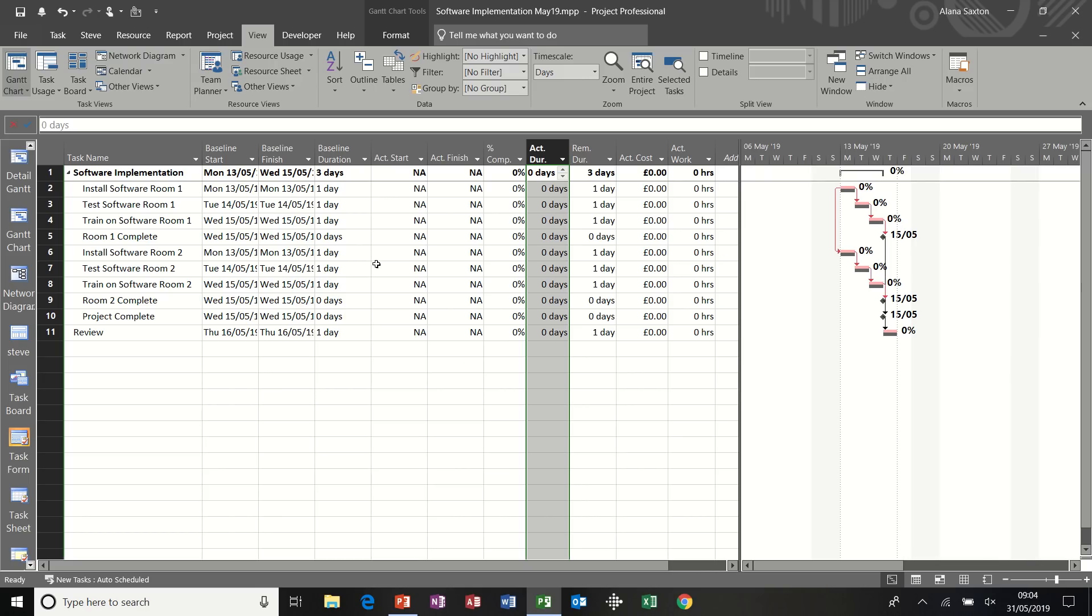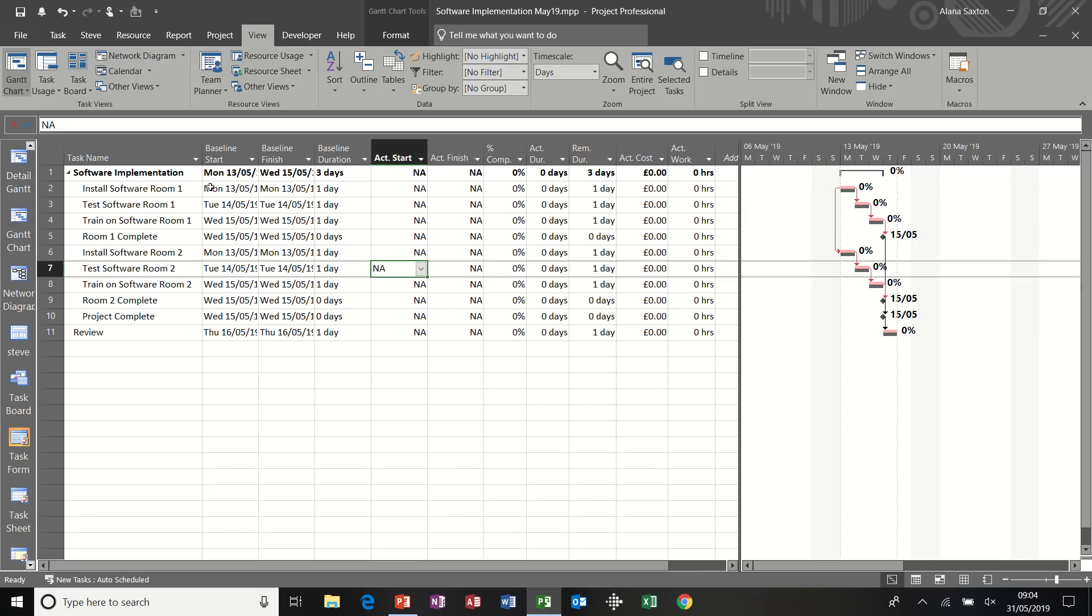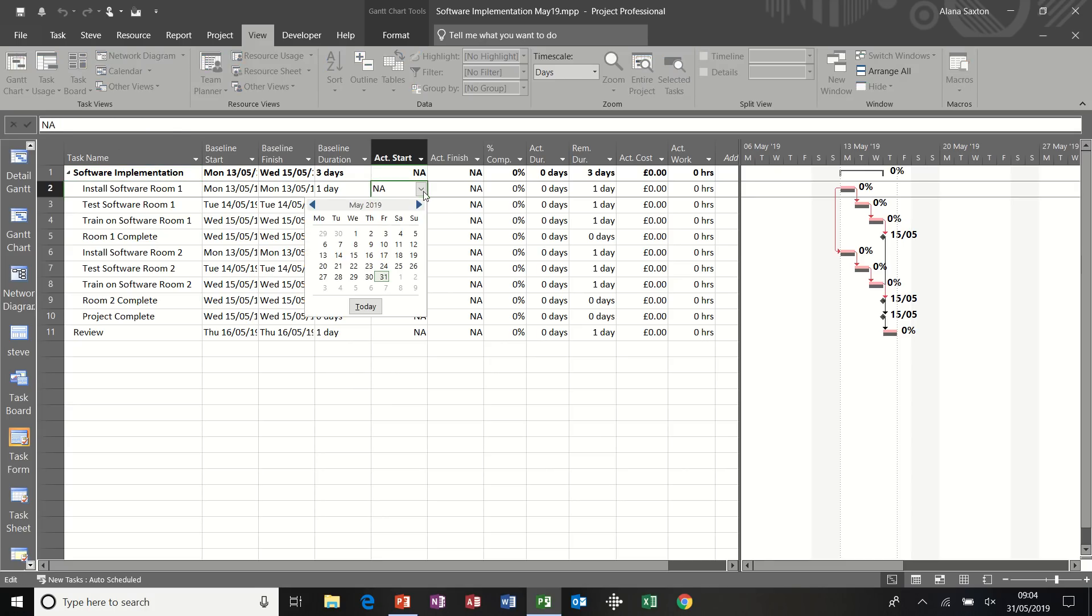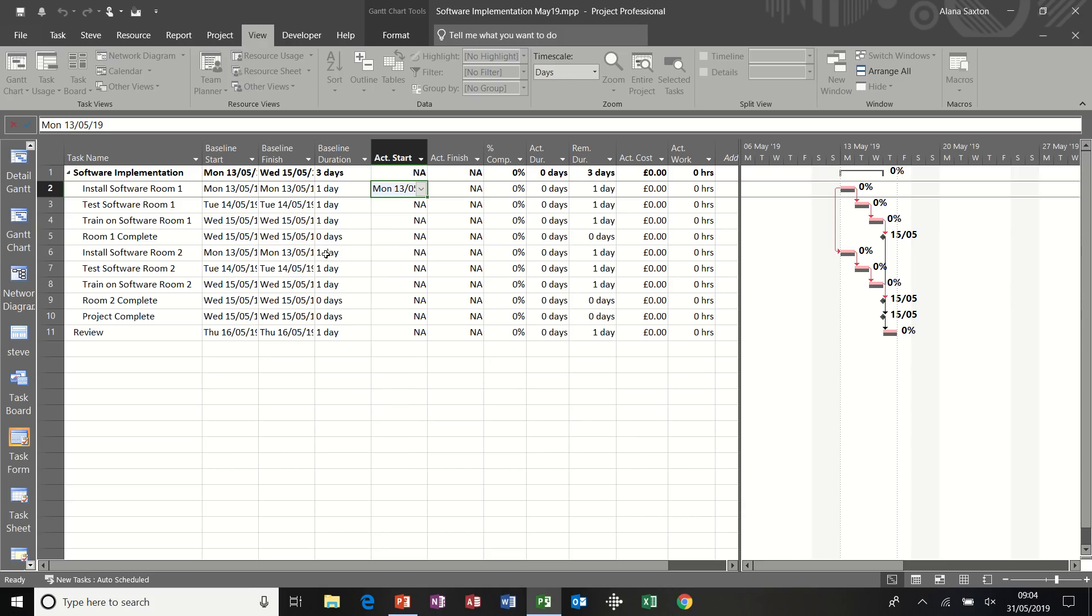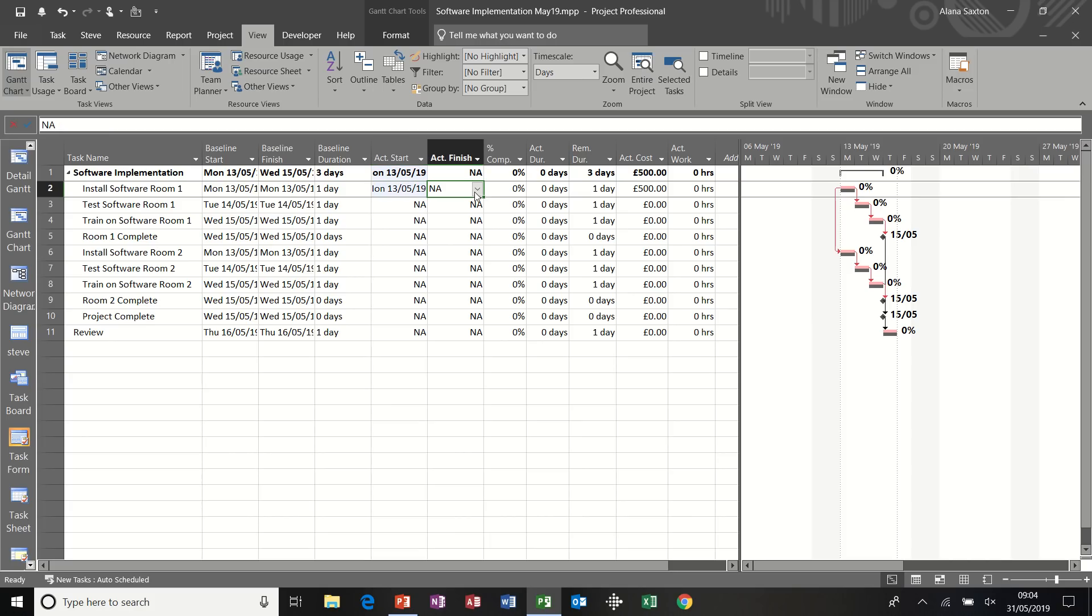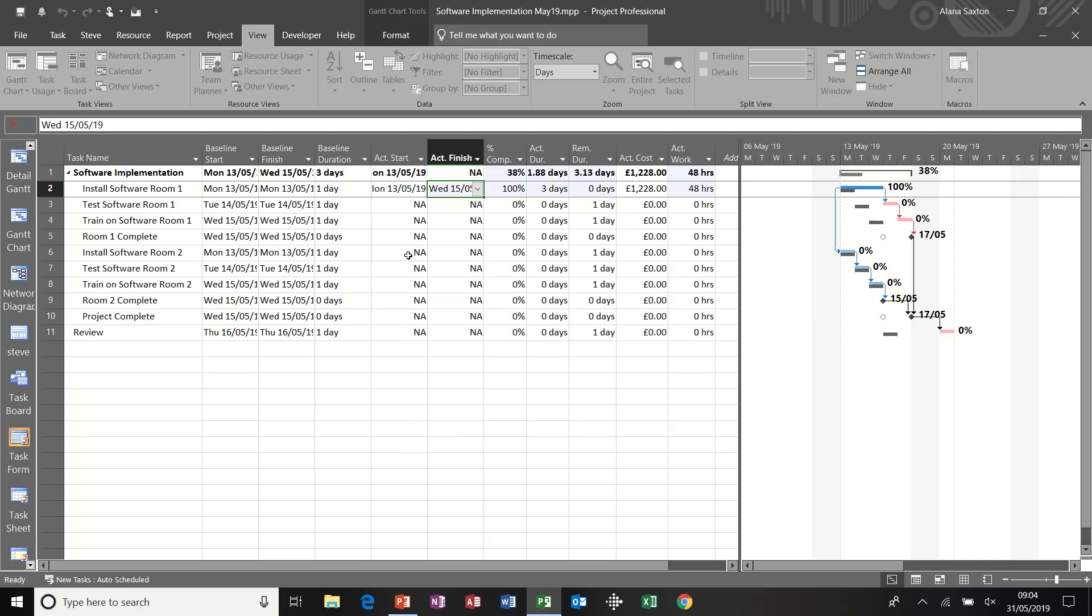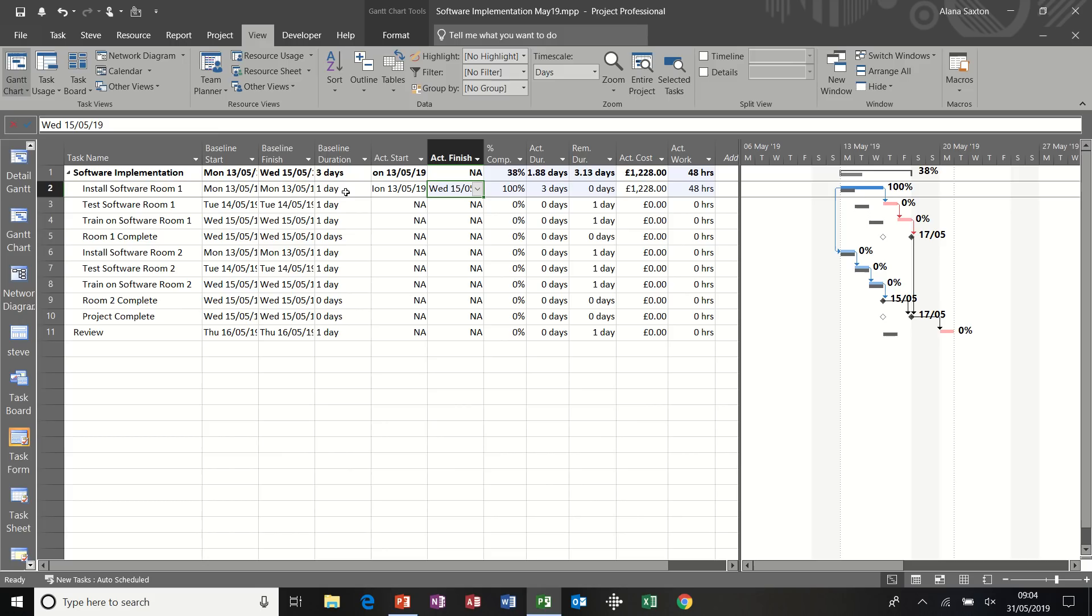So the process is this. So to update this project, this task install software room one, I've got several options. Let's say it did start on the 13th. So I can click in there and select the 13th. So it started on time. But its actual finish time was not the 13th. Let's say it was the 15th. So as soon as I put that finish date in, the 100% complete is populated. And the actual duration has changed to three days from the original baseline duration, which was one day. And that is reflected on the Gantt chart.